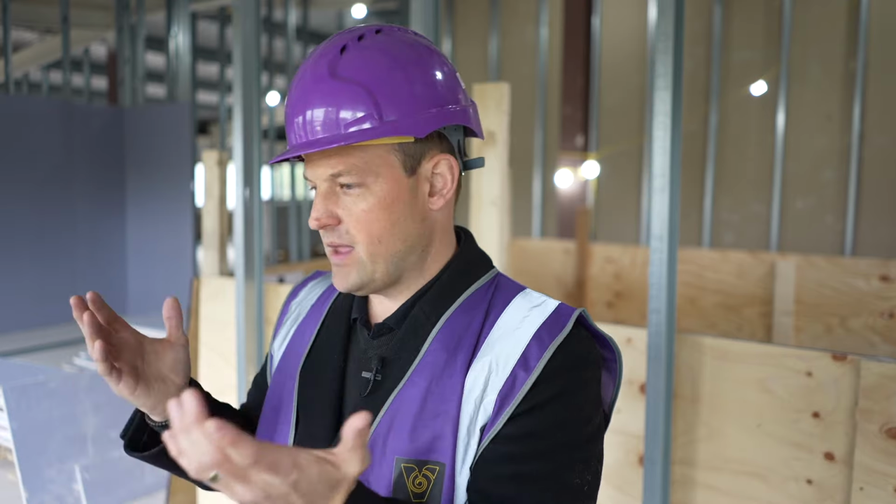So what you end up doing is you're going between the 3 contractors and you're seeing the big high items on them. You're also looking for some of the low items. If they've missed something, you don't want it to kill them, because if they go bankrupt during the job, that's no good.